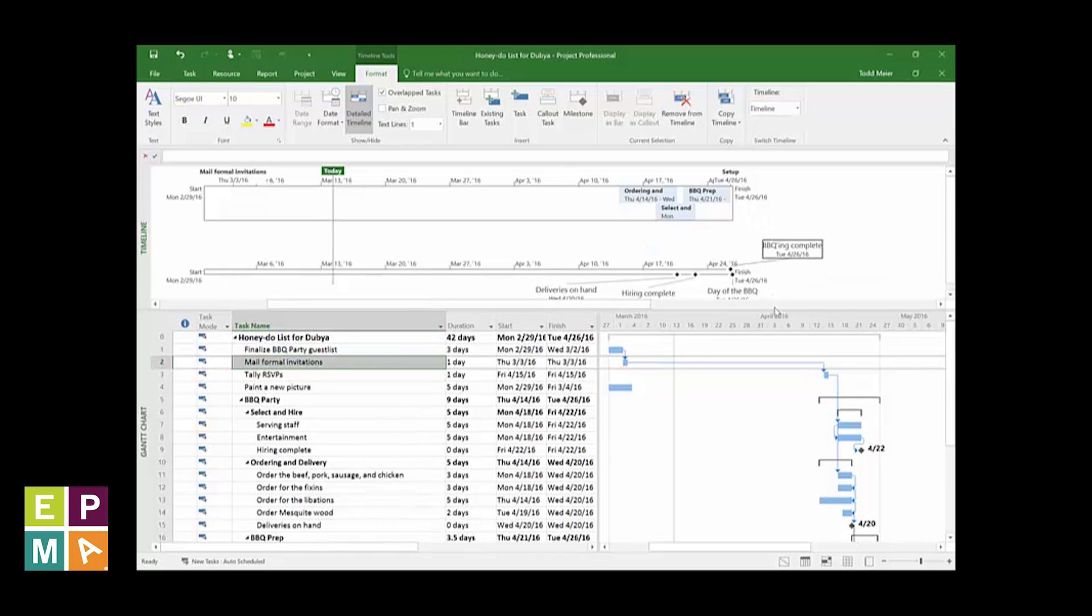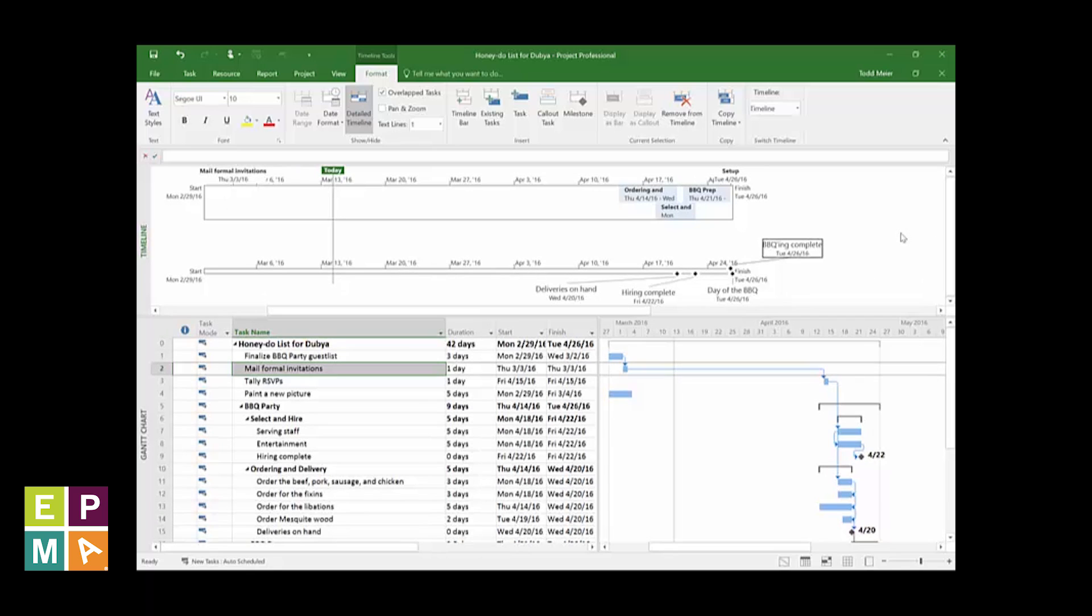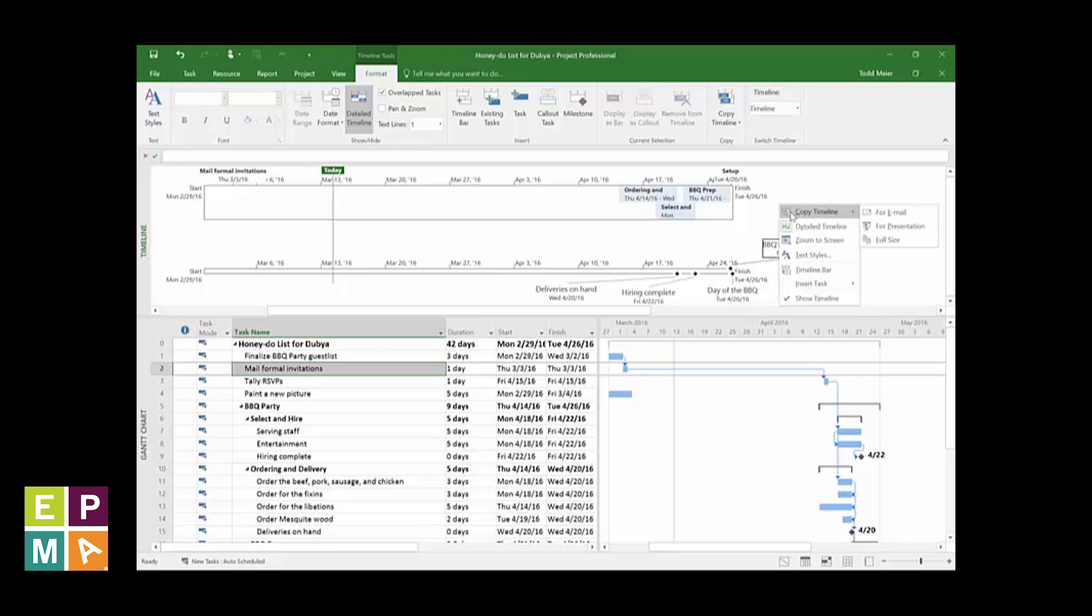Excellent, Brownie. Now that's one heck of a schedule, wouldn't you say? Now I can use email. I can send the timelines to Laura so she can stay instigated with the plan so we're both on the same page. Just right-click in the Timeline area and choose Copy Timeline. Then, select for the email. If I had an email open to Laura, I could cut and paste it there and send it.